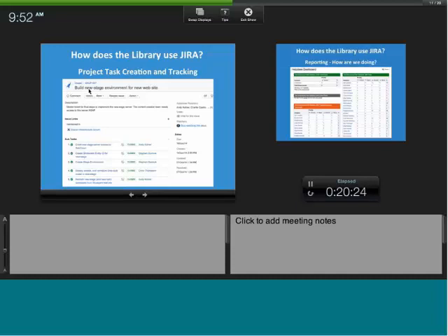Instead of having to create multiple issues that we have to relate somehow later on, we create one master task here. And the master task is build a new website. Okay, well, that involves a lot of different things. And so we make different subtasks underneath that, and we can track the progress of that. These are all done because you see the little green check mark next to them, and they all say closed. But this gives you the view of, okay, where are we in this overall task? How are we doing with it?